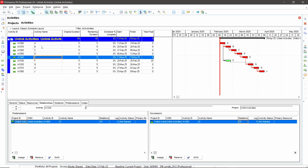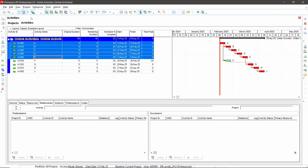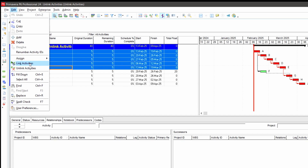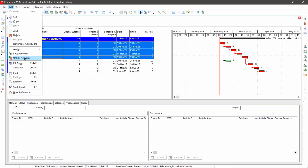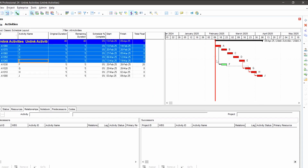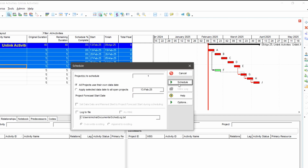I created a simple example with a bunch of ABC activities linked together. If you highlight a bunch of activities — let's highlight A through to E — on the Edit menu where we had only 'Link Activities' before, we now have 'Unlink Activities'. All the relationships are gone from between those activities.